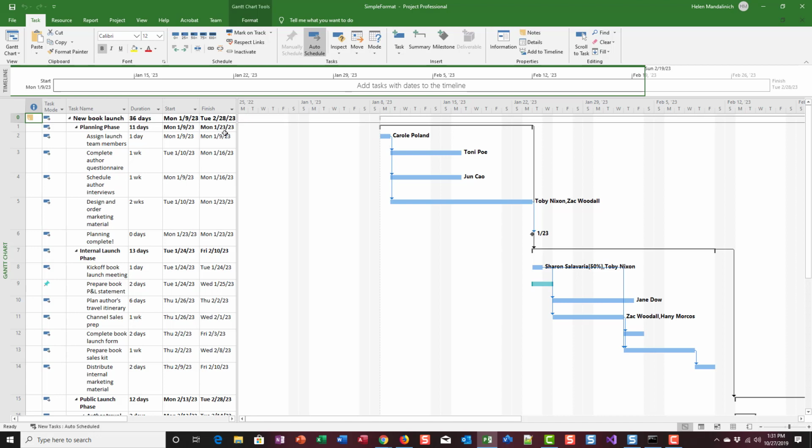So you can see that each of these corresponding tasks is a bar here on our Gantt chart on the right side, the chart part of it, and you see that it shows who's assigned to it. Here you've got a milestone, look, the diamond, and it's got a date on there. If you look across the top, one of the things we talked about is what timeline we're going to use. And so if you look at this project, you can see that it's really each day, and then here's a week, right? So that's the time setting that we did, how we wanted to measure that.